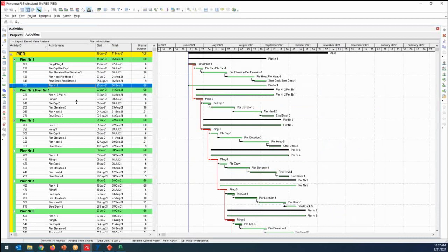Okay, so Primavera is one of the common tools in our construction industry, and I would like to just bring it from the Primavera. Now what I am doing, Primavera schedule here, and we can save the Primavera file by exporting, all right, in the name of the PR. So it's common, all Primavera people know that we can export and import Primavera files in XER formats.